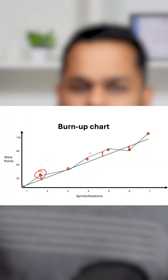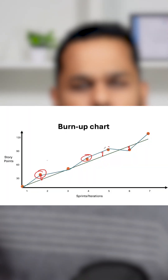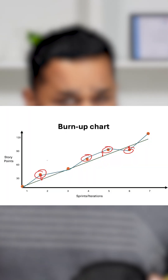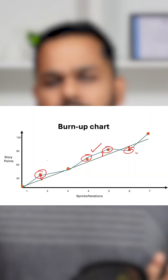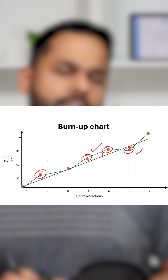Whenever your points are higher, it means you have accomplished more. Whenever your points are lower than the planned line, it means you have accomplished less. Here you are ahead of schedule; here you are behind schedule. Burn-up and burn-down charts both help us in understanding our performance through a particular release or through a particular iteration.